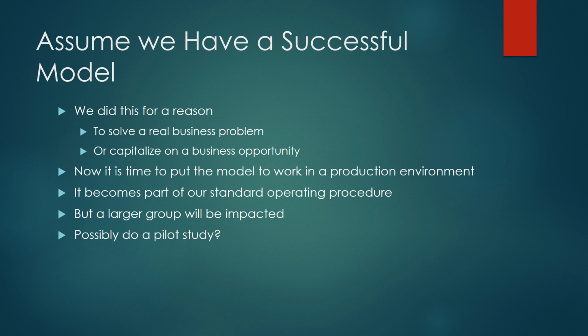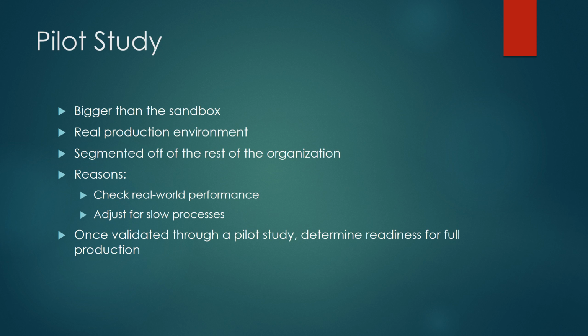One of the things we might think about is, so far we've been playing around with the data and with our analysis in a sandbox, and that's seemed to show positive results. But if we're leery or risk averse and don't really want to take the solution live in a full production environment, we might run a pilot study. The pilot study is going to be bigger than the sandbox, and it's going to be run in a real production environment. But it could be run in a part of the production environment that represents the full production environment, yet is still segmented off from the rest of the organization.